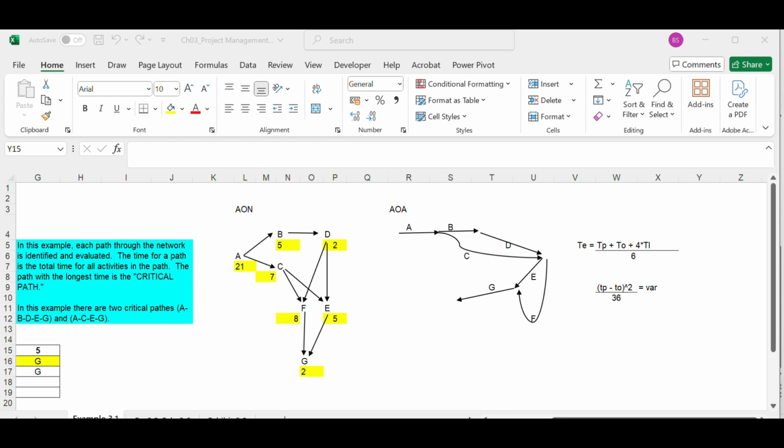Now let's talk about some good practices in estimation. We need to perform the estimation at normal conditions. We should involve several people to estimate, use a common time unit, and make the people doing the job do the estimate. The estimate shouldn't be optimistic or pessimistic. Independence should be assumed while estimating. That is, first estimate should be independent, and then slowly, one by one, pull in dependency to the estimate. Always, you should test the assumptions while doing the estimate.